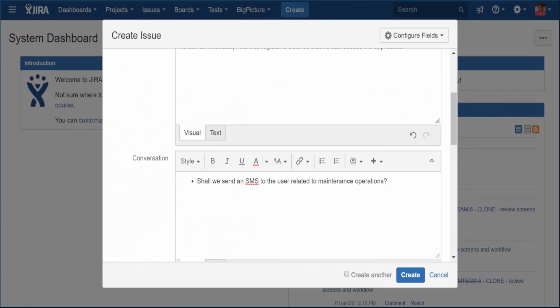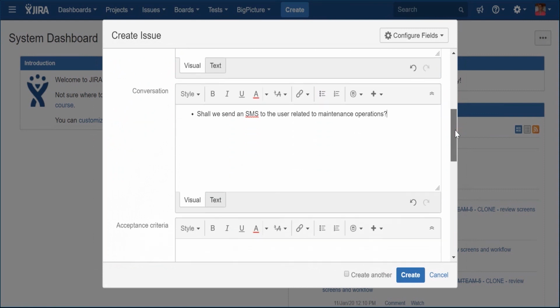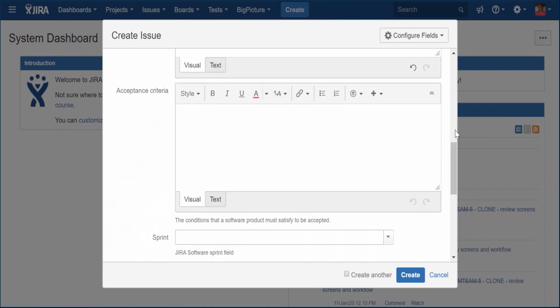The acceptance criteria, also known as the confirmation, according to the 3Cs model we just mentioned above, is essential in the context of the user story in the sense that it will ensure alignment between the team and the product owner about what to expect from the story. For instance, something like, when completing registration and submitting the application form, the user will receive an email to validate his application. This attribute is extremely important since it should be from here that the team will start thinking about the necessary test cases.